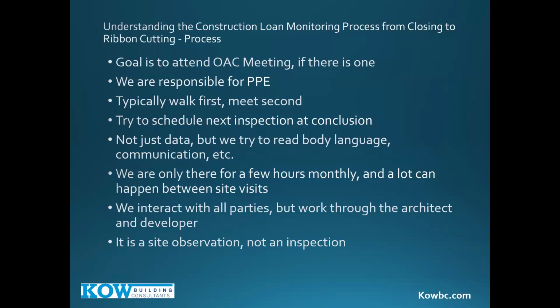We go typically monthly in line with the requisition. So it is very possible, and actually very common, we could show up on March 4th, and they're just finishing framing of the 4th floor. We show up on April 4th, and all the sheetrock's installed in the walls. We never saw the copper, BX, the HVAC, the fire caulking, the insulation, any of that. Someone did. Who? The inspector. Someone inspected that wet wall. Someone inspected the insulation and the fire caulking and gave the thumbs up to install the sheetrock. So inspections occur all the time on projects. It's just not our role in so much as we're looking at the requisition for payment.